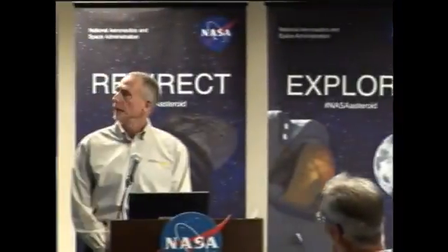So I thought that was very cool, but I was a little surprised at the end, your recommendation for doing this as a proto-flight. What was driving you to that recommendation? Well, it's certainly reduced cost and schedule, and so that was probably the primary reason we put that in there. It's certainly not necessary. If there's sufficient time and money in the program, we could build a dedicated flight unit, if that's what the program wanted to do.